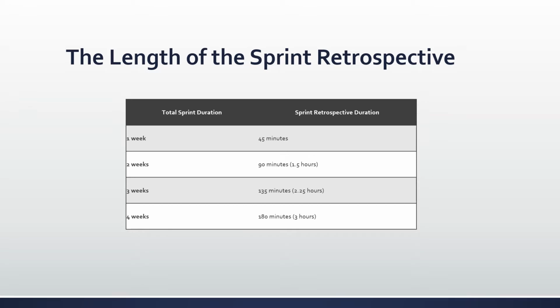So during each sprint retrospective, the Scrum team plans ways to increase product quality by improving work processes or adapting the definition of done, if appropriate, or not in conflict with product or organizational standards. By the end of the sprint retrospective, the Scrum team should have identified improvements that it will implement in the next sprint, and implementing these improvements in the next sprint is the adaptation to the inspection of the Scrum team itself. So although improvements may be implemented at any time, the sprint retrospective provides a formal opportunity to focus